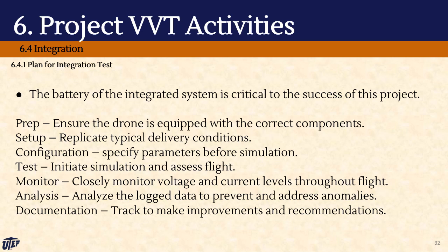The battery of the integrated system is critical to the success of this project. The plan for the integration testing is broken up into 7 items. The first one being prep, what needs to happen before anything else. The second one is setup, so configuration for the simulation. 3 is the actual testing. 4 is monitor, so real-time observation. 5, analysis, which is done to understand the results. And then lastly, documentation, which is used for future improvements throughout the project.